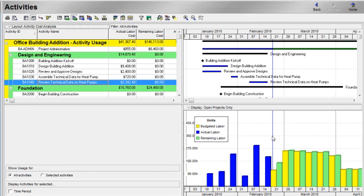Costs and units allocated to your activities for each period in the time scale are represented as vertical bars. You can also display curves for charting cumulative costs or units over time.